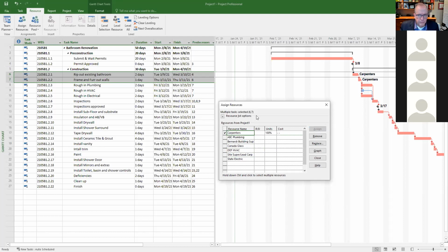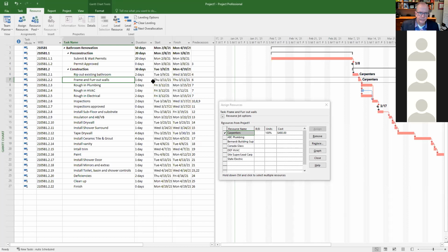Oh, yeah, I know it. So if I go there, there's the price. This is 1 day, and they're getting paid $60 an hour. So 8-hour day, 8 times 60, $480. 2 days, $960.